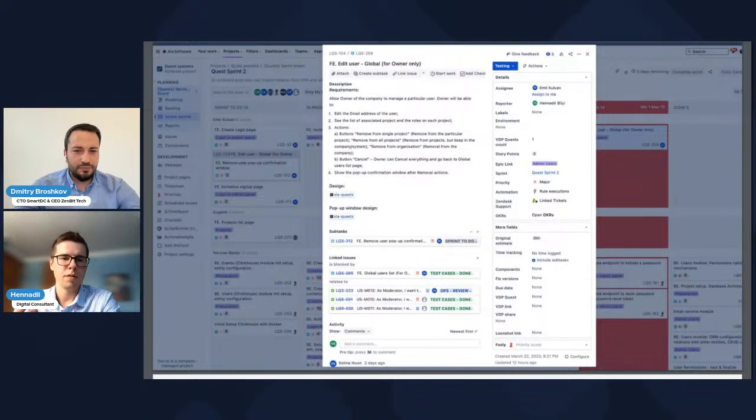What I mean by that is when the application is quite big, you have hundreds and hundreds of those tasks and subtasks, and you have to somehow control your development and your client or your senior manager that observes that. So that's how you do it. You connect those stories that later on you're going to check the done tasks, and see if the story is done or not.